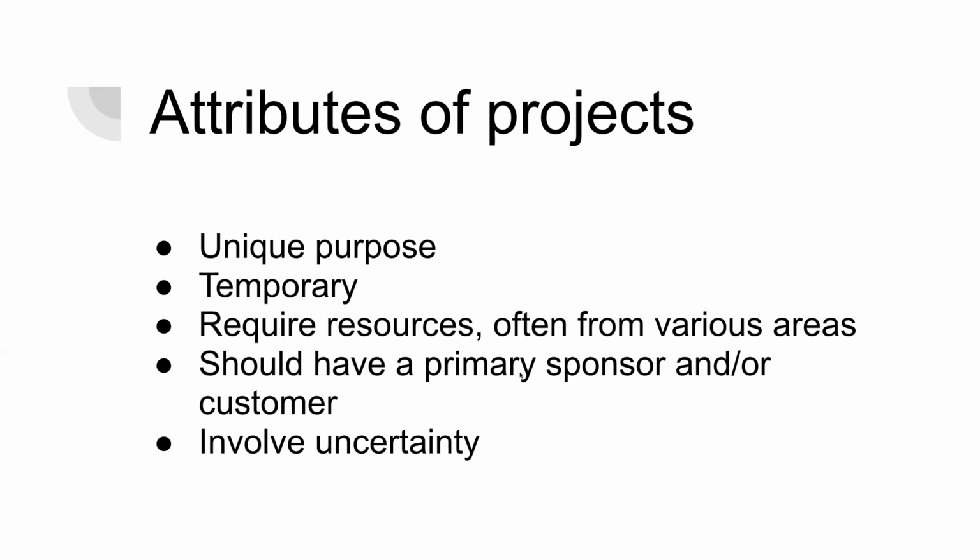So we might need to clarify, or we need to say, okay, if you need this in 1 month, certainly there are things that we might skip. Okay, we might skip going through thorough testing. Okay, we are not able to completely make this reality within 1 month. So we will skip thorough testing.